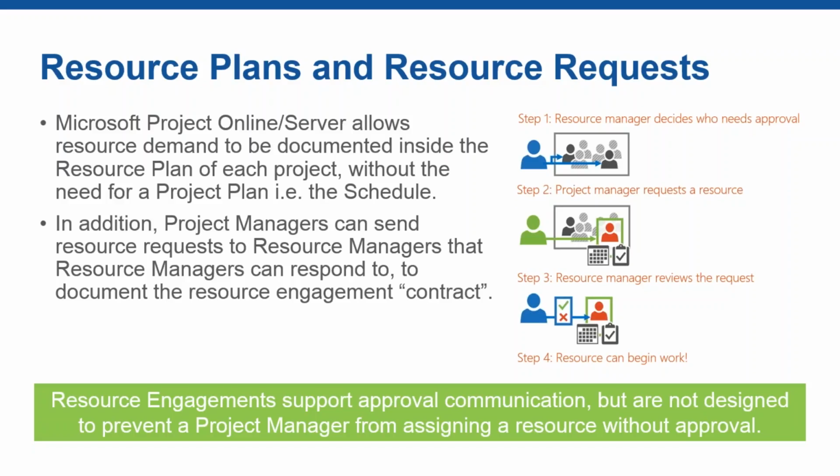What is really important to point out, though, is that this resource request mechanism, also known as resource engagement, only helps facilitate communication and document agreements. It is not a security feature, so with or without this capability, project managers will still have the ability to assign virtually any resource to the project plan or to their schedule and assign tasks as necessary.